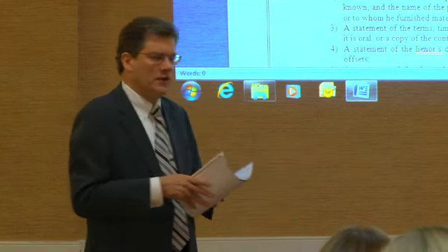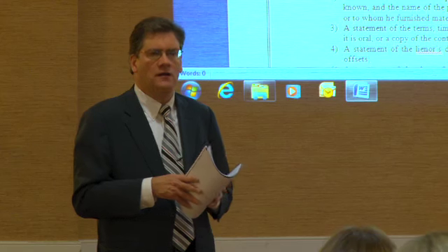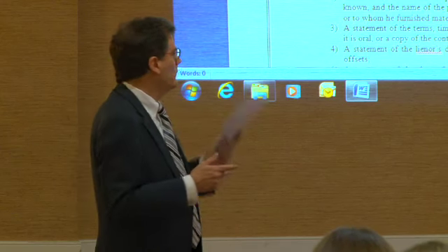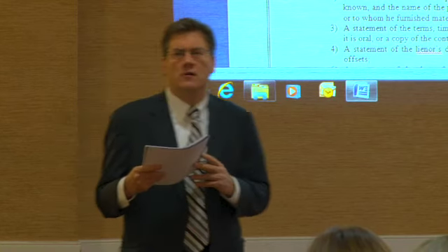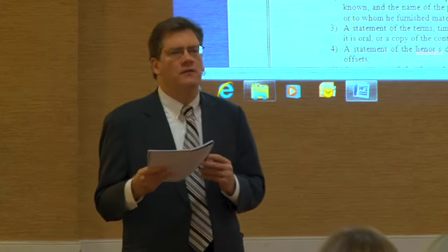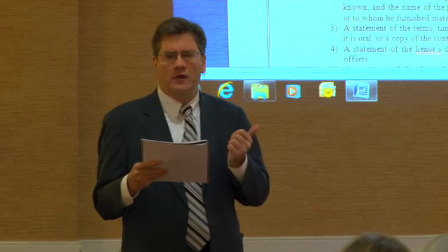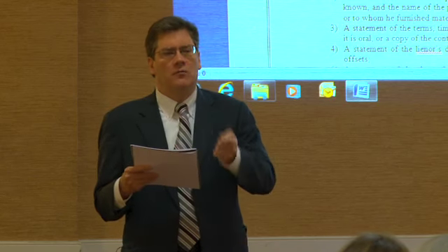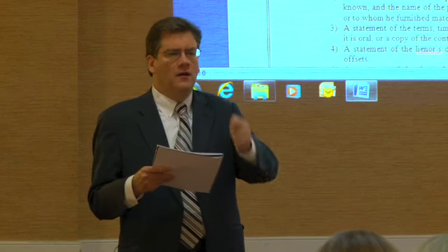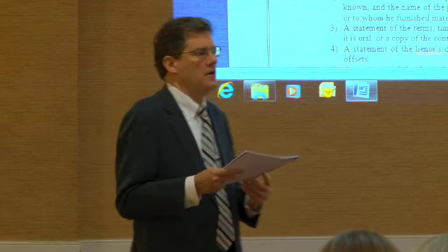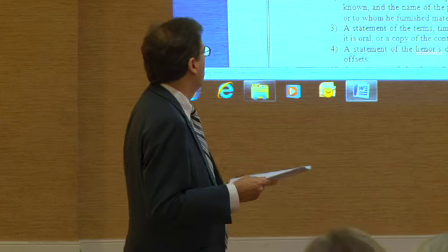Okay, now this is the big dog, which is a lien claim. This is the reason you're sending out a preliminary notice, because you can't record a lien claim in Arizona without having first given notice in the form provided by statute that you are supplying labor and materials to the project and giving that notice to the owner and to the other parties listed by statute: the general contractor, the lender, your own customer.